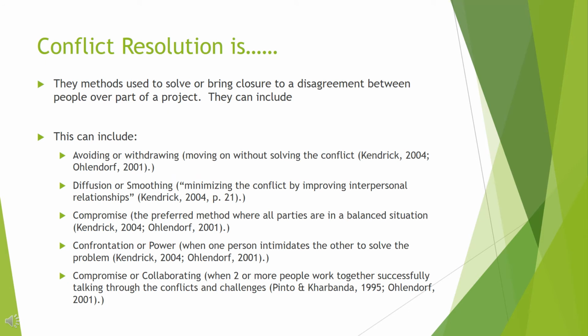Conflict resolution is the methods used to solve or bring closure to a disagreement between people over part of a project. They can include avoiding or withdrawing, moving on without solving the conflict, diffusion or smoothing, minimizing the conflict by improving interpersonal relationships, compromise, the preferred method where all parties are in a balanced situation,